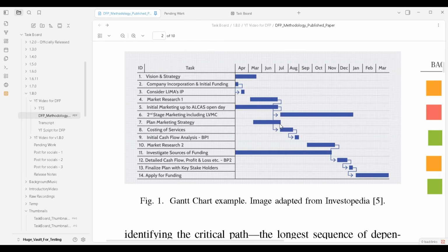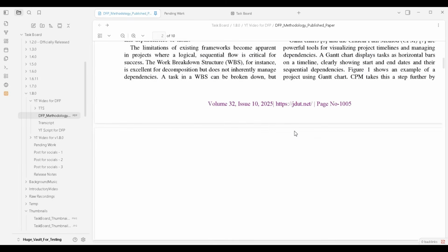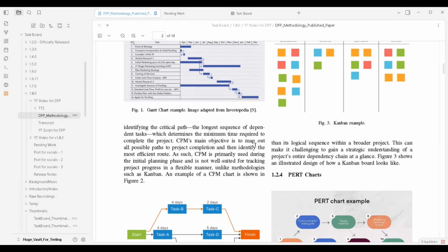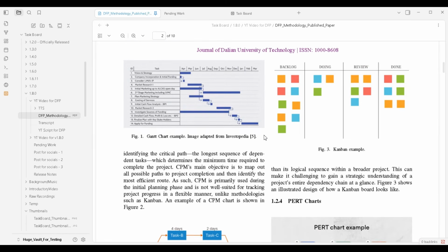is that it's schedule-centric, which enforces a criteria on the team that all the tasks which you want to put inside this chart should have a fixed time duration on it. So the start and end time of the task should be clearly mentioned. This restriction breaks the flexibility in the management for the team, and it becomes very difficult to think clearly and visualize the tasks which are currently present on the Gantt chart and which are not yet scheduled.